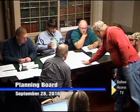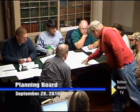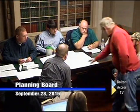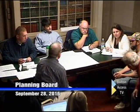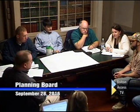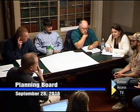Well, we're close to the next step, which is getting ready for the blasters to come in over here. And this road, to build out that road, keep in mind, you can build the road, but you really can't complete it 100% till the houses are also built. I mean, you could, but then the tractors ride on the finished pavement and would ruin it.